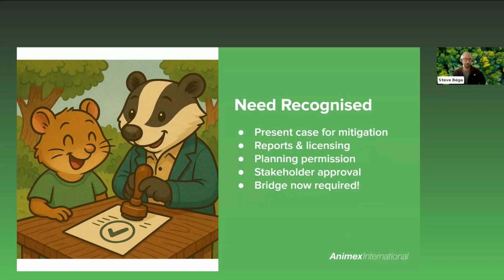In some cases, particularly when water is involved, the Environment Agency is also a key stakeholder, and we're currently working on a couple of projects, one again particularly in Cardiff, where they are a key stakeholder. These stakeholders all have significant influence and may affect project scope or timings, so maintaining open communications with all parties from earlier stages is really essential. And then once the need has been recognised and agreed, this now means the bridge is a requirement and you can move on to the detailed design stage.